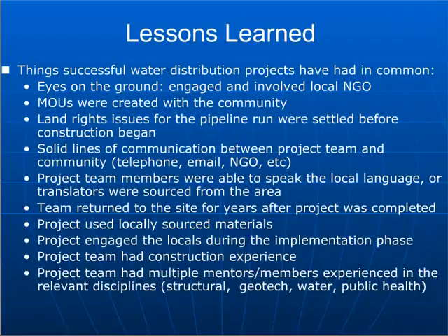Again, having that memorandum of understanding is important. The issue of land rights, and making sure that if you're proposing to put a pipeline through a particular part of the community, that whoever may own that land is agreeable to that and is willing to allow that to happen. That's important.